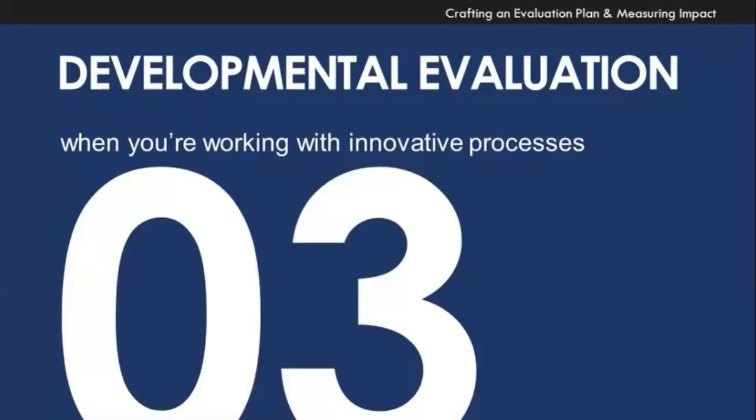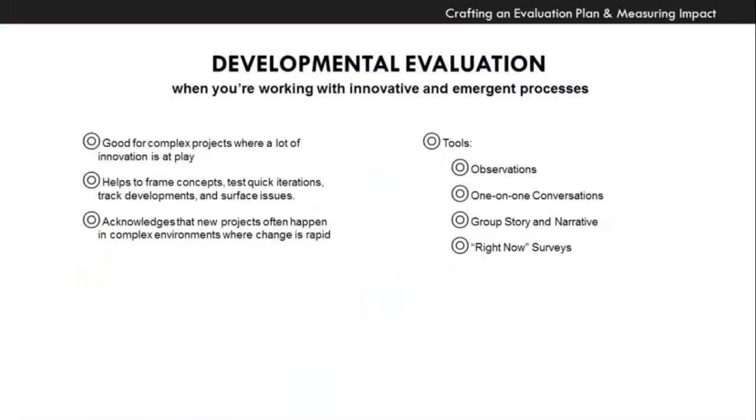So we need to be able to move much more quickly, much more iteratively, test ideas within the project, and surface new issues and react to them. So techniques for this are going to be much different. You yourself might be doing observations, noticing not only what you see, but what you don't see happening. A very good thing to do, if you are the project manager and doing evaluation, this happens often, is to develop the habit of not only going to meetings and helping them happen, but taking those 10 minutes right after to write notes about your observations and getting into the habit of noting those.